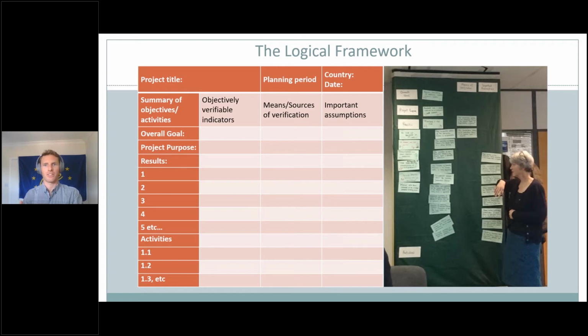The log frame expresses the changes in state you expect to achieve as a result of your project outlined in your proposal. It helps establish a causal link between inputs, activities, results, purpose, and the overall objective. It defines the assumptions on which the project logic is built and identifies the potential risks for achieving objectives and purpose, and therefore helps contingency planning and your risk assessment.